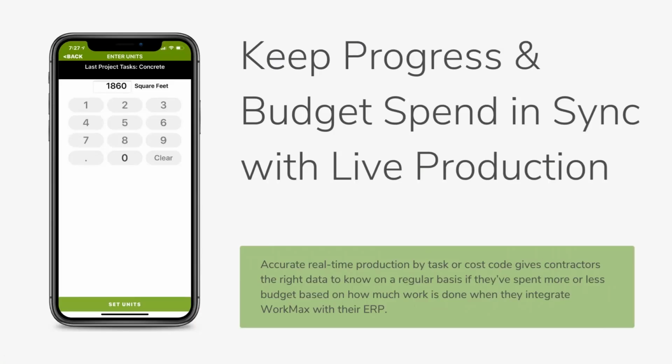Aside from making sure you got the right people at the right place, confirming all of that data, we want to have the ability for them to put quantities in. So we can flag this quantity tracking prompt when a cost code requires unit entry. So as they go throughout the day and complete something, they can put those totals in. Now, if for some reason you don't want them to do that until the end of the day or the end of the week, that's fine.